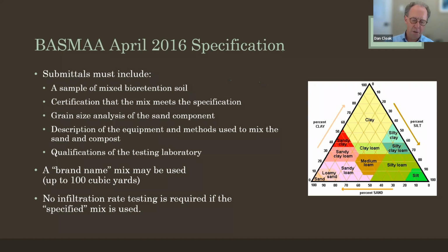does a good job, maybe an overly good job, of ensuring that the test results from samples taken at the yard are submitted to a laboratory and come back meeting these requirements, so they're very detailed. The problem is it doesn't address making sure that that's the same material that gets delivered to the job site and installed.